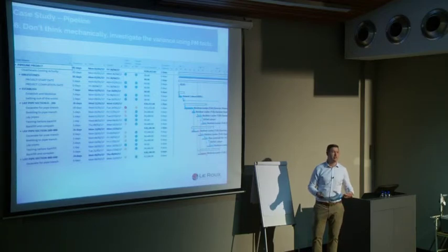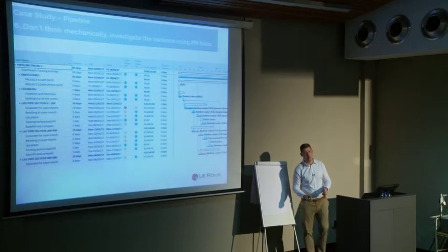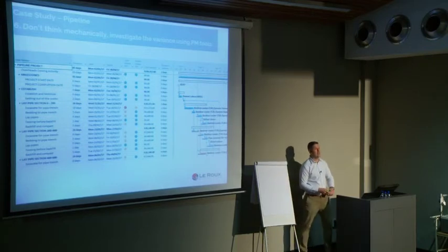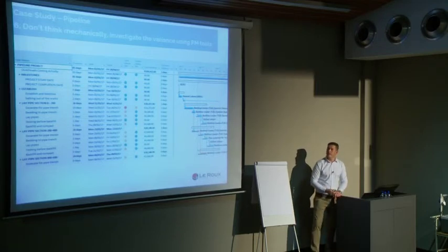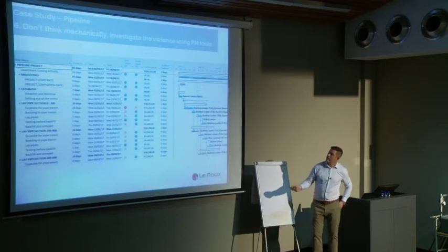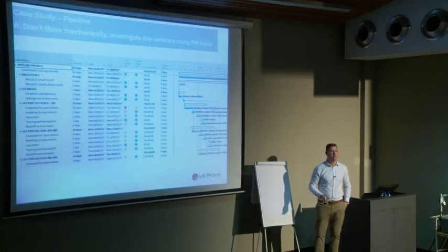What does that mean in terms of cost? Those resources are there working 2 days more. That TLB is costing me per hour. So if it's working there, it is generating cost for which I'm not going to get any value. So I've only allowed for a 10-day period there. Also, where else? I see no other time. So why would there be cost variances on items where there's no duration variance?